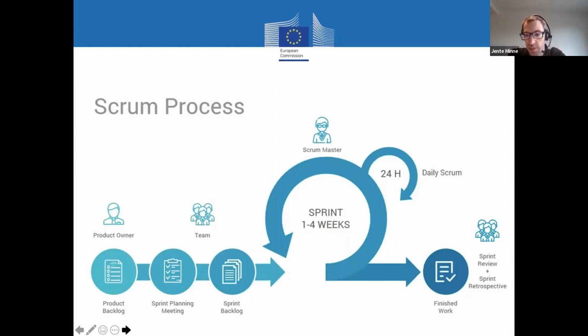And then you finish, and then you basically get an increment on your product. The idea is that after these two or three weeks, you have a product that you're at least able to put in production. The decision to push it to production or not might, for some reasons, be no, we don't put it in production. But the idea is that at least what you provide, you can already put in production.